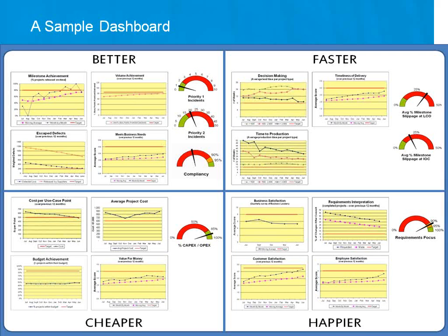Now you can measure that at the end of the project. You can say, well, compared to your initial estimate of story points, how many did you do? And you can get a percentage, and that percentage can be aggregated across all the projects.